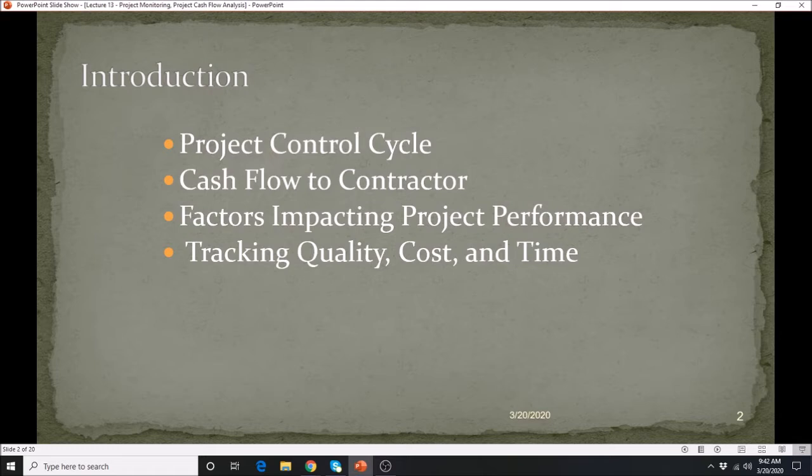We have projects in progress, which we call in the construction industry, birds in the hand. And then we have the projects under contract but not started yet. Those are birds in the bush. And then, of course, the third one is the prospective or potential projects, which are expected to start in the coming financial accounting period. We call this the bird in the sky.